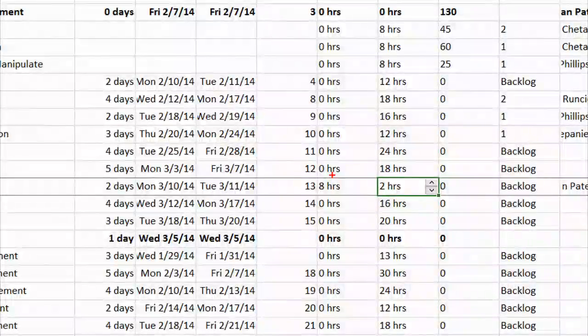Because I know around timesheets, we're talking about timesheet categories, timesheet periods, and capturing actuals. Do you want to talk a little bit about some of the scenario options as far as moving those actuals and what to do with them? Sure. Let's say you are doing a project schedule and you really don't know what it's going to take. Then you want to publish that feature to the team lead and let them estimate the time, and then get the estimate into your project schedule that way. That way you are getting buy-in from the dev team. They are trying to figure out what it is really going to take to do that work instead of just having a number thrown at them by the project manager. Again, that's through custom fields, right? Yeah. Okay. So that way it is more useful.